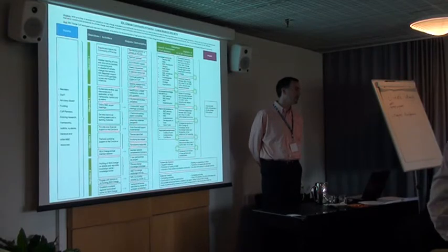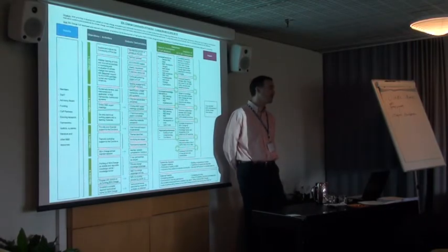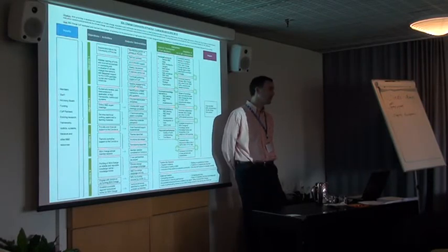It would have been so much easier if your answer was the following. We recognize that in the HIV/AIDS place, we have a 50% incidence of HIV/AIDS, and we would like to see in 10 years' time or 5 years' time a 50% reduction in HIV/AIDS. That's the model of a problem and solution statement that makes it easier to hang all of your work into. But when you say we'll have a meeting every year, then we will reset our targets, it starts becoming very difficult to navigate an organization.